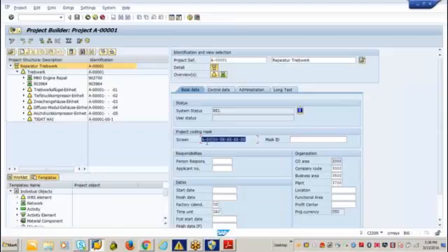So in order to indicate what kind of projects they are doing, they always start with IN, IF, AG. AG is for agriculture-related projects. If it is an agriculture-related project, it always starts with AG. If it is an infrastructure-related project, then it starts with IN. So it's not that only one letter is allowed here. I will show you where this particular coding mask is coming from. So this is the first point while defining your project.